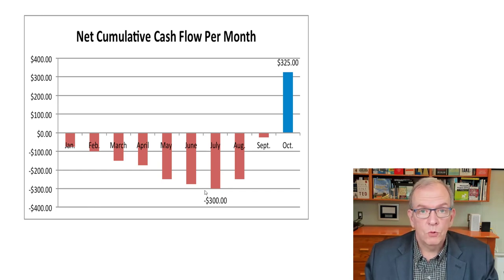You definitely want to make sure that you have enough liquidity, that you will have cash available or lines of credit or financing available that would take you through these rough spots where you have in excess of $200,000 owing. So that's giving you a pretty good indicator that there's a large amount going out. You'd want to make sure well in advance of getting there that you have that in place.